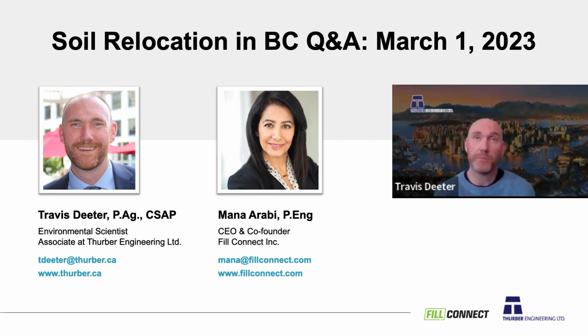And so that would be determined pretty early on, as the developer would know what they want to build on the site, and could probably save themselves some money by hiring the consultant directly rather than going through their contractor and paying a markup or something, and having the assessment work done itself.